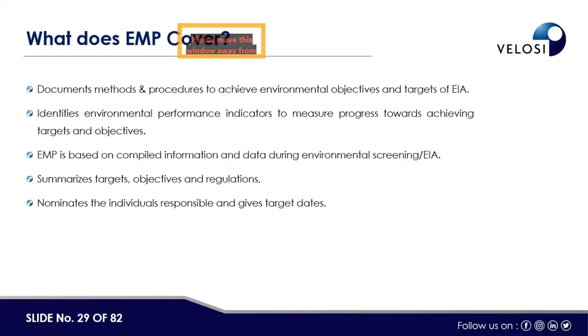As I mentioned before, the EMP also provides the institutional requirements: what resources we require to implement the EMP and who is responsible for what. What is the responsibility of the project manager, what is the responsibility of the engineers, HSE engineers, environmental engineers, and environmental officers? Then what are the responsibilities of all the employees, and what are the responsibilities of the subcontractors as well.